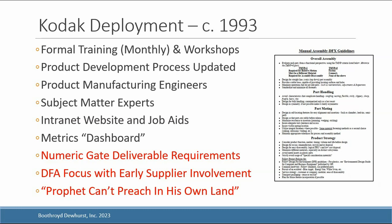We had almost all of our own manufacturing departments on the floor below us. And the problem here is that the process engineers viewed the designers as their quote-unquote customers. Customers are always right. And so they did not push back on the designers as they should have. And collectively, we did not collect the data, the DFA and cost data that we needed to in order to be data-driven. And so we weren't as successful as we otherwise could have been.